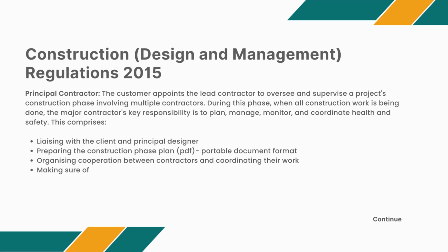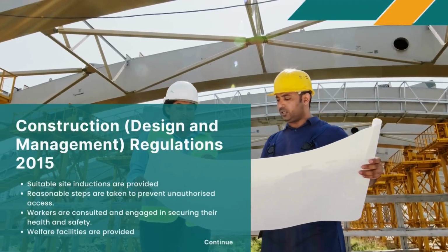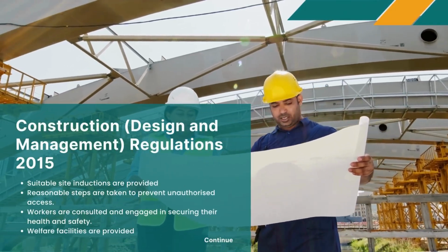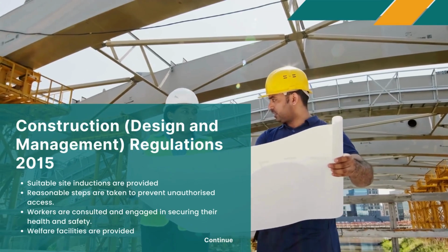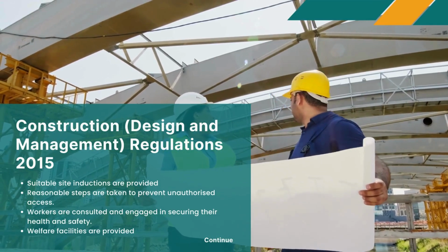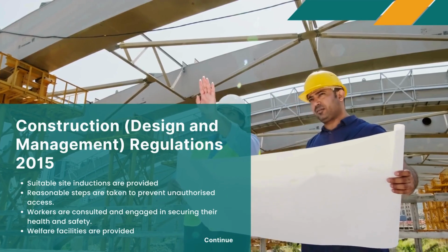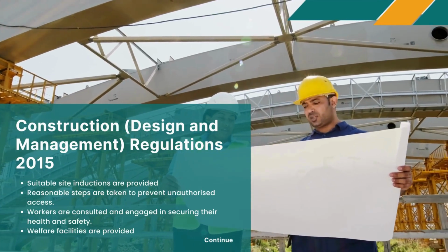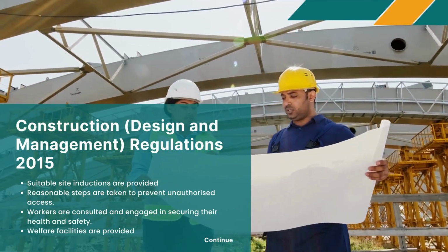This comprises liaising with the client and principal designer, preparing the construction phase plan (PDF, portable document format), organizing cooperation between contractors and coordinating their work, making sure suitable site inductions are provided, reasonable steps are taken to prevent unauthorized access, workers are consulted and engaged in securing their health and safety, and welfare facilities are provided.